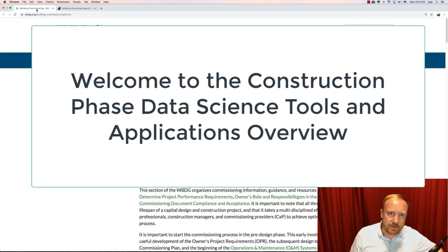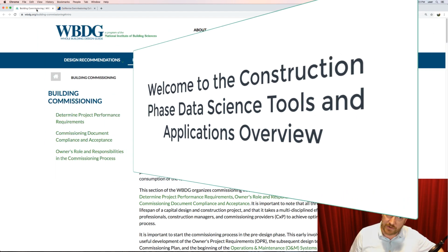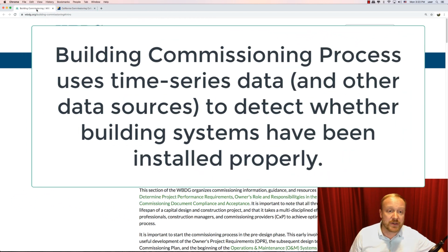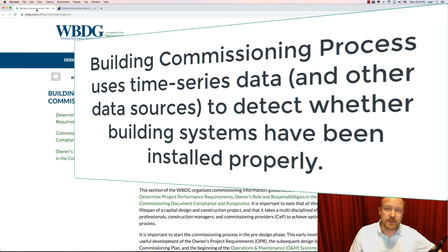Using the data from the actual tutorials and from the introduction to this set of videos of this week, I talked a lot about what's called building commissioning. And the commissioning process I focused a lot on because it uses different types of data from the actual building once it's being constructed. And the goal in the commissioning process is really to find problems, to find where things went wrong, where systems maybe are broken or not installed properly, and the building commissioning team is meant to find those issues. So there's a lot of opportunities for data science and automation in this process.